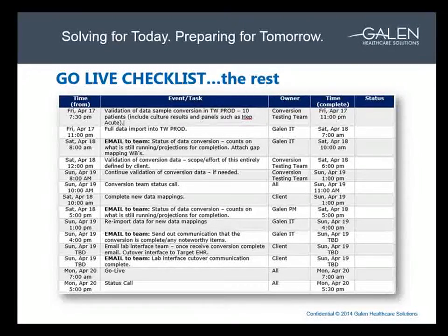I also want to point out that typically, as far as communication goes, there are begin and end day status emails. That's very helpful so people know if you've got some testers on standby, for example, when can they come in, what's left to be done, is it going to take the entire time period, 2 or 3 days, or is it going along better, or is there a delay of any kind?